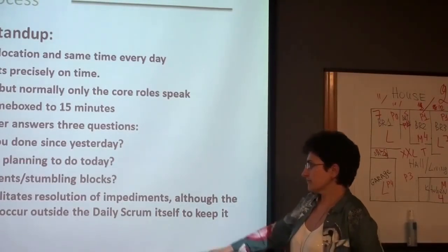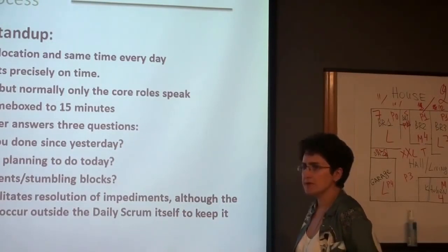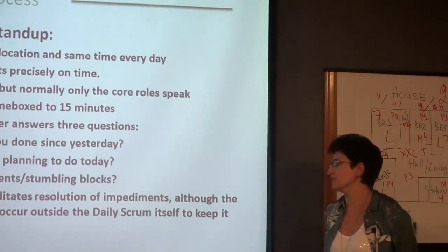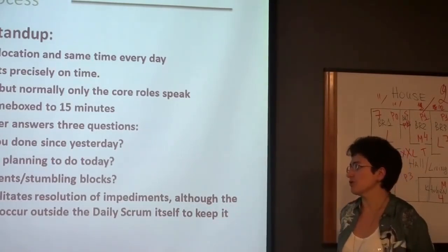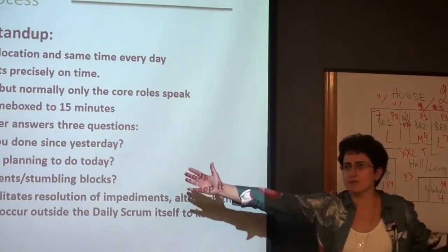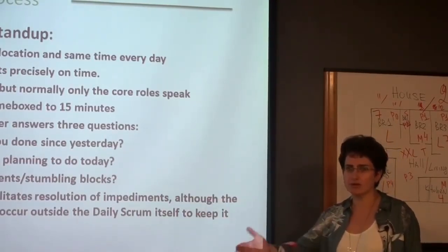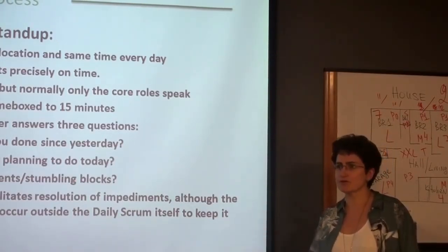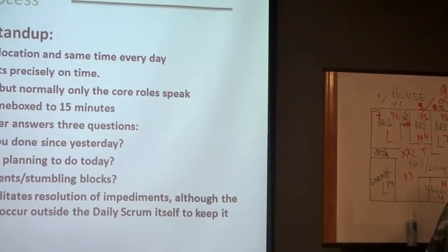And the Scrum Master is supposed to resolve the impediments and remove the obstacles. And the resolution should occur outside of the daily Scrum itself, because otherwise your Scrum meetings may take hours and hours. And you don't have that luxury when you have only 1 week, 2 weeks, or 4 weeks to deliver your increment of the product.